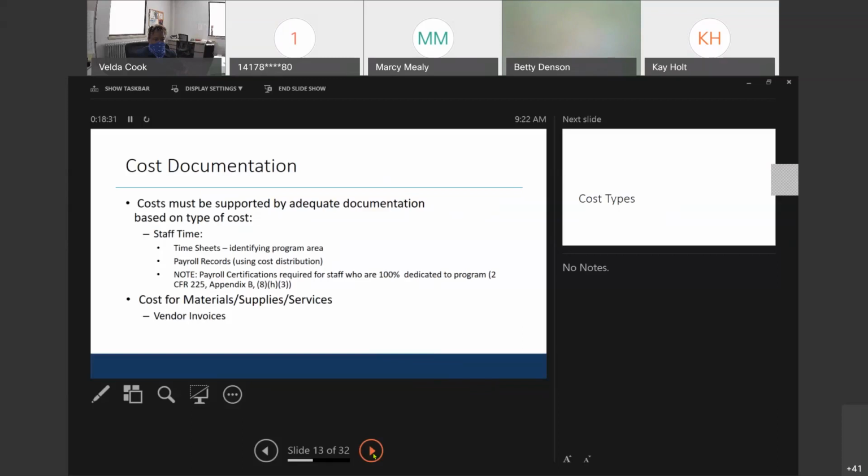So you have the subgrantee, which is the unit of general local government, because the state is granting the award to the unit of general local government. The UGLG may in turn partner with a subrecipient to help deliver the project. The UGLG might also contract with an entity, whether that be for project delivery / project implementation to deliver the project. And that's a competitive contract.